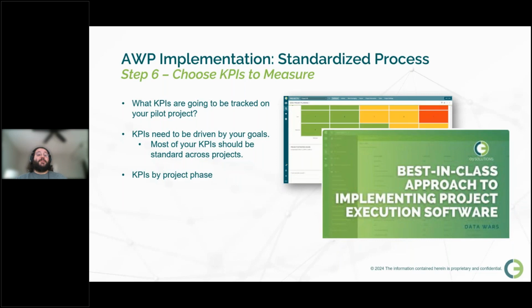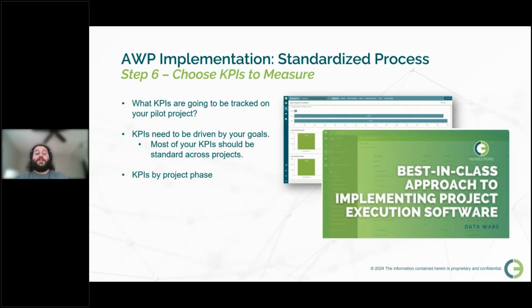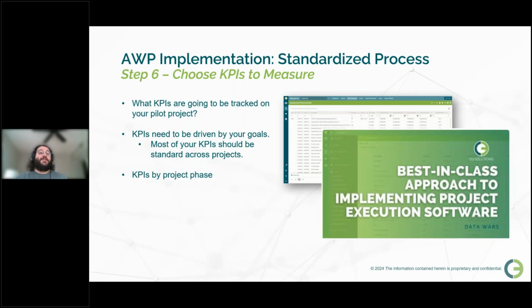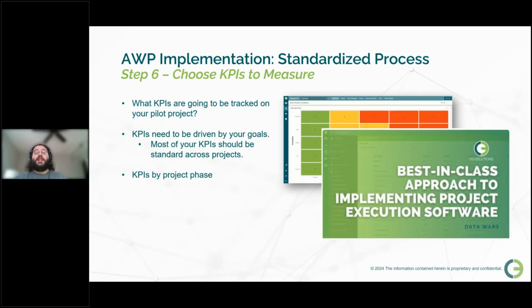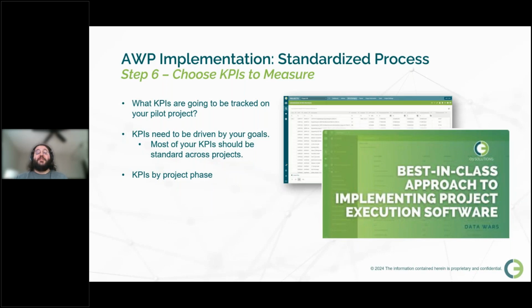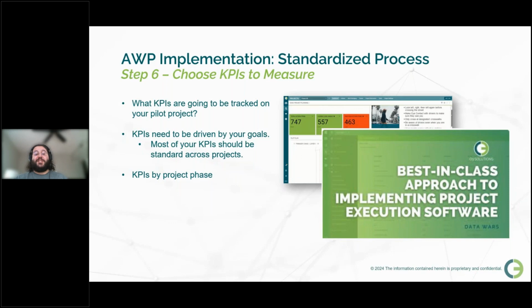Do you want to make sure your material arrives on time? Do you want to reduce the time it takes to execute out in the field? Are you being mindful of safety while considering all of these other things as well? Most of these KPIs, as you might have guessed, will be dependent upon the stage your project is in. If you're in the design phase, you're likely more concerned with how efficiently your engineers are producing drawings. Whereas in construction, you may want to see the average time it takes to complete an installation work package, or IWP.